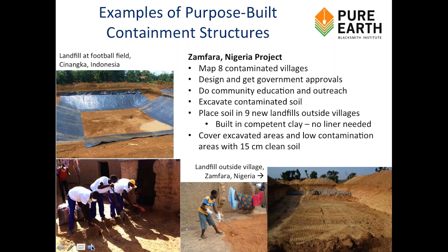Fortunately, there we had very competent clay, very low permeability clay. So we did not need a liner, which was very fortunate because there were no liners available in that area of Nigeria anyway. But in that site, after we got the government approvals for each site, we built the landfills, excavated the soil.